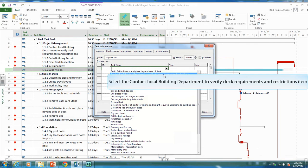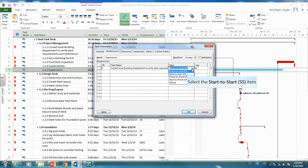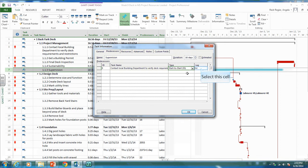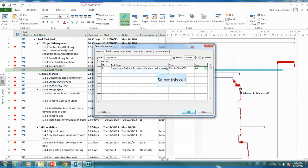I can put that, and I'm going to have this as a start to start relationship. Once that activity has started, the supervisor can start supervising. I'm going to put a half day lag here because we'll let them do some work before we start checking up on them. So it's a start to start relationship.